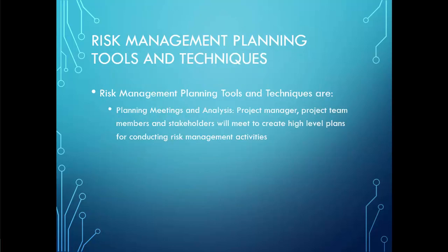To plan for risk, the project team will meet with stakeholders, collecting activity-related information and identifying uncertainties and possible risk. The team could also use historical data from other projects with similar activities, or could consult with some experts.